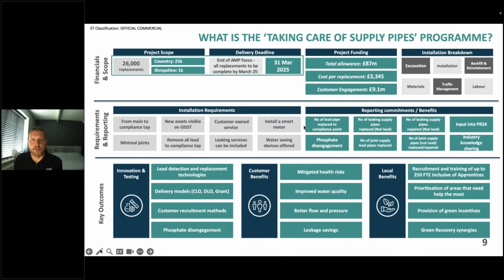It is quite tricky having to do the entire piece of going into the customer's property, because originally on older pipes, they would just tunnel them underneath the foundations, bring them up into the kitchen usually, and the supply pipe would be there. So it was not always easy to just excavate, because we couldn't go inside people's kitchens and just tear their floor up. Then there are the reporting processes, which AWWA has asked us to do. So we had to look at the different number of supply pipes we were going to do.